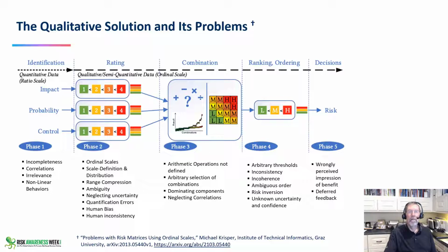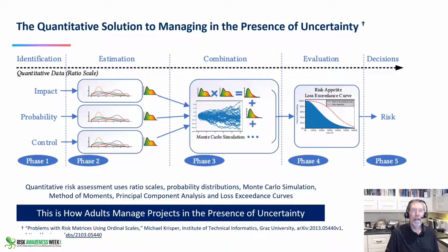But this is not risk quantification. There's no numbers in there that you can make decisions on other than to take the next step to go find out what those numbers are. To do that, we have to do quantification. So now we've got to make models, usually Monte Carlo models. There's several other methods. Method of moments is one. Design structure matrix, coupling and cohesion models are others. There's a bunch of things around. But then we can do these real estimates with actual, quantitative numbers. Then in the Monte Carlo simulations, we can actually do arithmetic between probability distributions. This distribution times that distribution equals that distribution in my Monte Carlo simulation. Then we can produce a nice chart, and then we can make qualitative verifications through our quantitative numbers.